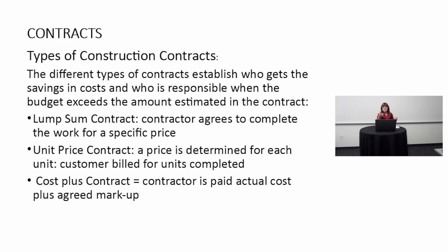We do a lump sum contract. We go out. We thought it was going to take 3 days, but instead it takes 5 days. But we have made a lump sum contract, so we cannot charge extra for those extra 2 days we were there. We have to have accurate estimating.